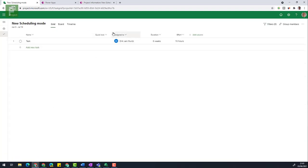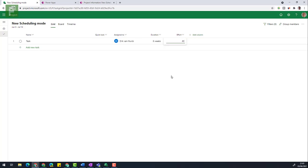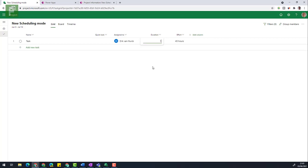So if I can click on it here, I now know that these are fixed duration tasks. So if I change the effort, the duration will not change. Or at least that is my understanding of a fixed duration task. And indeed, the duration stays for six weeks. Now, if you change the duration itself, be aware that the effort will also change accordingly. So do not change the duration of a fixed duration tasks after you have entered the effort. That is something to keep in mind for sure.